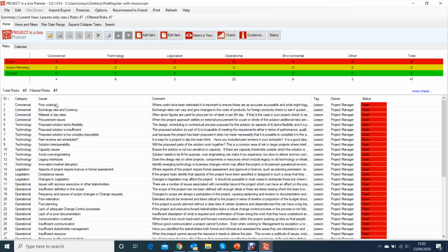The sort of thing that might have been picked up during a lessons learned exercise. We had a problem with currency exchange rates. Goes into the lessons log. Hopefully then future projects look at that lessons log, identify that as a problem and think about it on their project. Why not just shortcut that issue and identify, which is what we've done here, the common problems that our sort of projects might have, and put them as a pre-existing list of risks. So when you open a project, you're hinted at these are the sorts of problems we've had in the past.